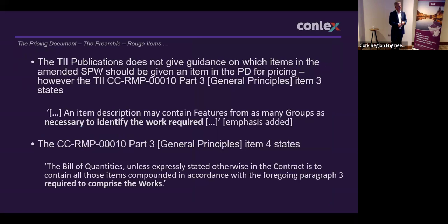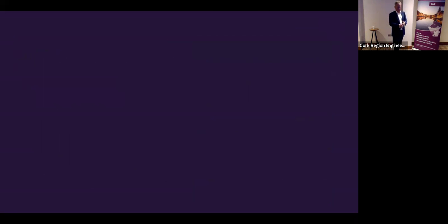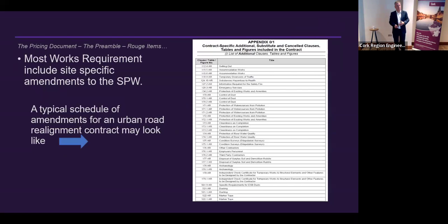But as I said, you need to make corresponding changes to the method of measurement. If you don't, you will have site-specific specifications that haven't been itemized in the pricing document, where the contractor has been given no opportunity to price. And therefore you have a compensation event. Okay.